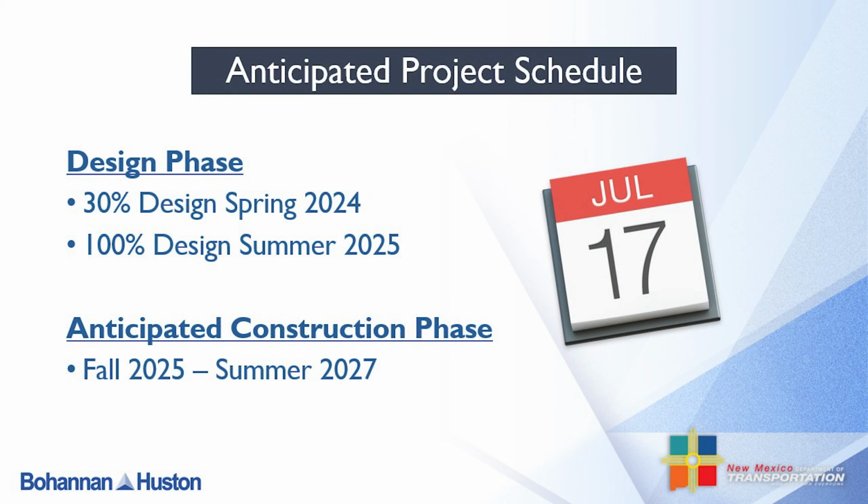Moving forward, our project schedule is to submit preliminary 30% design drawings to NMDOT within the next month. After that, we are targeting summer 2025 to be fully complete with design. This means construction could start as soon as fall 2025. It is expected to last 2 years, leading us into the summer of 2027.